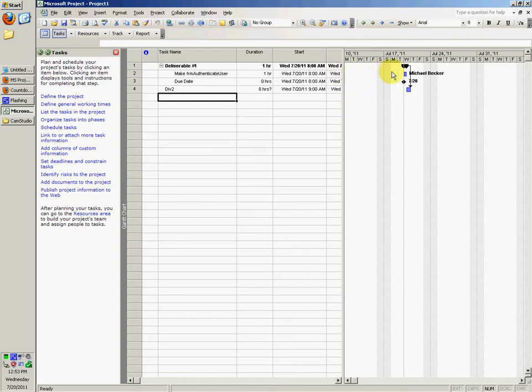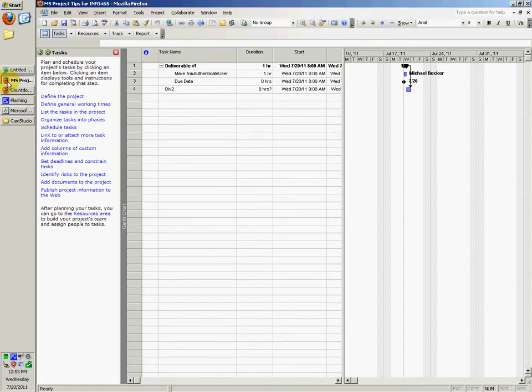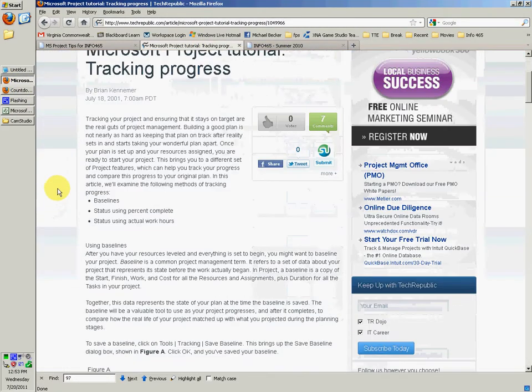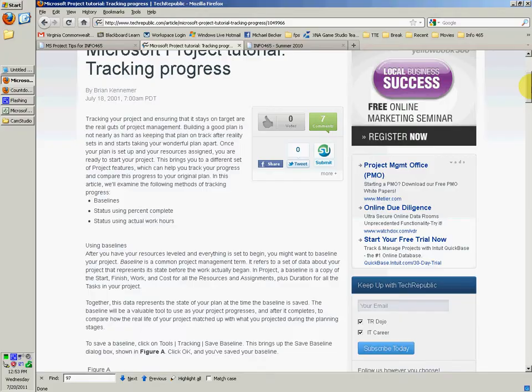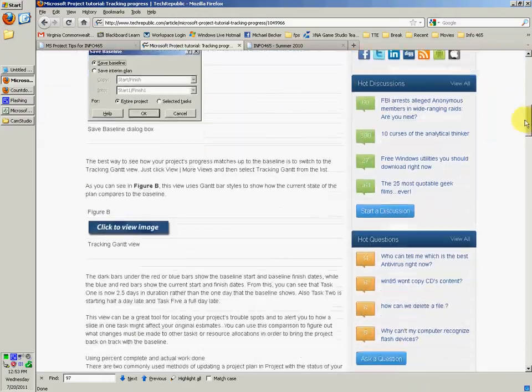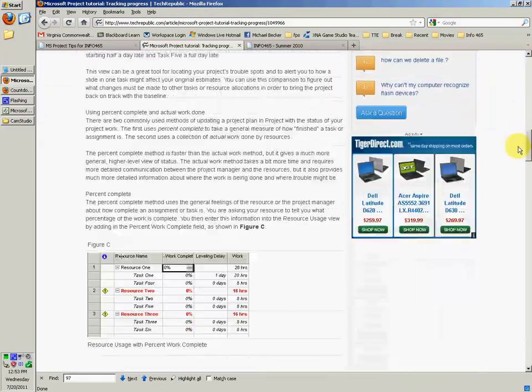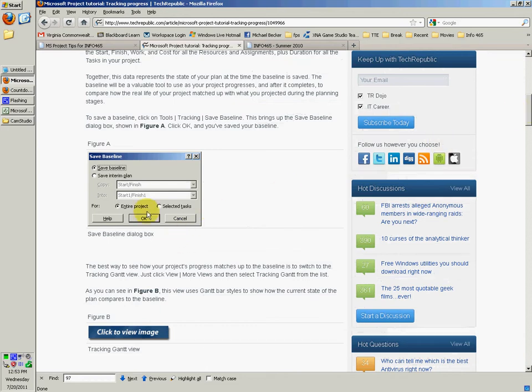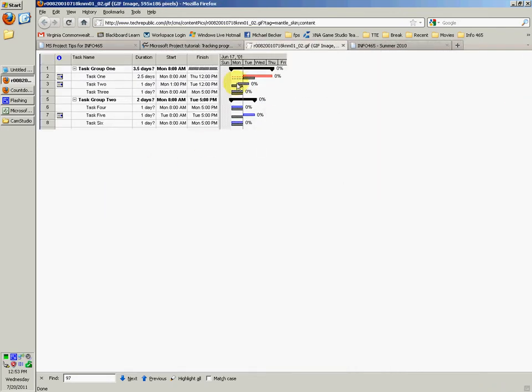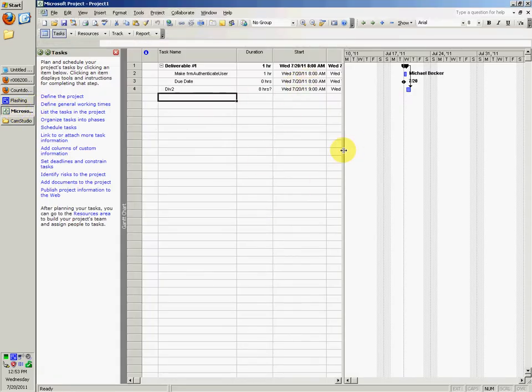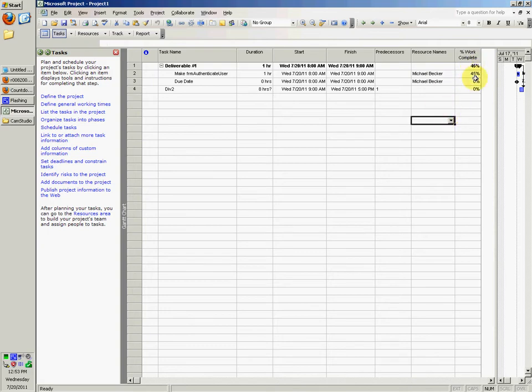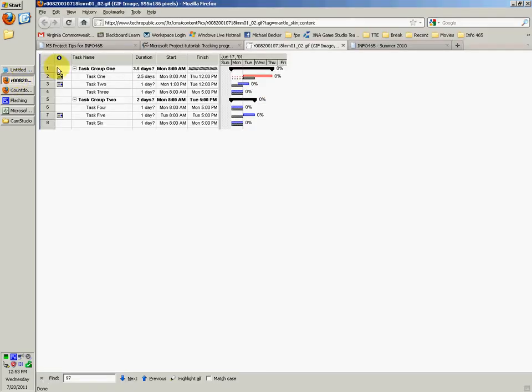And then you would see over here the baseline. Actually I have a page right here, this will actually go into more detail on how to do it and what it looks like. Basically you save the baseline, and once you do a couple more things, you can view it as whatever work's actually completed, which you would update this right here to actually say that you completed this 45% or 100%, however much you've completed. And it'll show up right here, this little gray thing is the baseline, the red one is the actual.